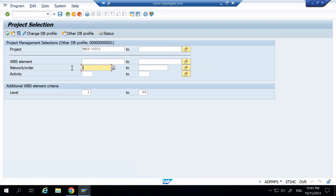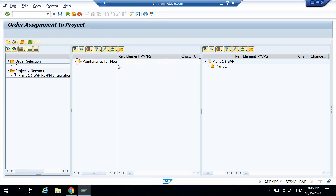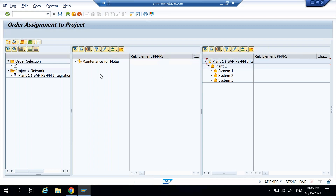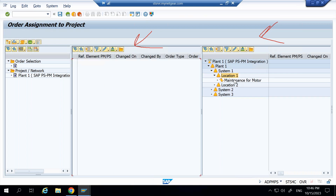Apart from assigning the WBS element individually inside each order via the Additional Data tab, there is a transaction through which you can directly drag and drop. The transaction code is IEMBS. Here I select order type PM01 and execute. I set the database profile and select my project 'MEE-0001'. I remove the default network order entry and execute. On the left side I see the maintenance order available to assign to the project, and on the right side I see the project structure. I drag and drop the maintenance order onto location one in the project structure.